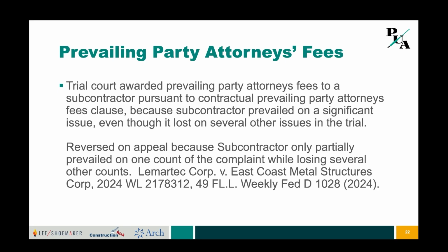Yes. The problem with the prevailing party attorney's fees clause is that it is contrary to American law. Under American law, each party pays their own attorney's fees. And when you agree to pay another party's fees, you're really making a contractual liability. You've created a contractual liability to pay the other party's fees. That is not insurable. You have a contractual liability exclusion in your professional policy. So carriers will tell you, an insurance carrier will say, strike out that prevailing party clause altogether. And so that may be our first thing we do.